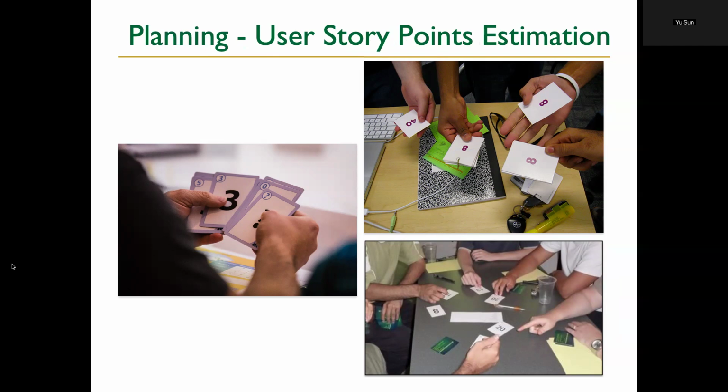Everyone can only work on, for example, our project for 3 hours per day. Everyone has 15 hours per week, and that adds up to a total of 45 hours. So maybe the tasks in total should add up to 45 hours. Does that give you some justification for how you do good planning?